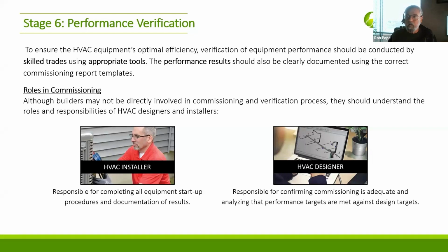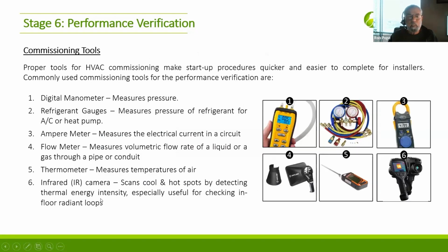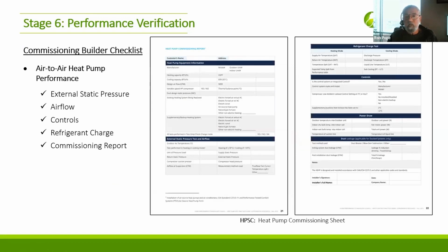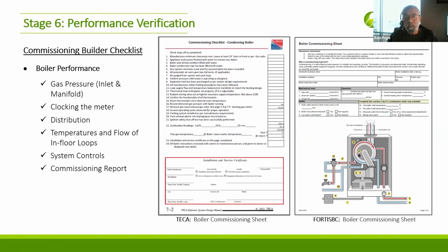That verification is a process, and it's a process that requires the right tools and instruments and procedures. And once that's done, it should all be documented, recorded. There's a lot of documentation available, a lot from the manufacturers directly in their own startup sheet requirements, but also from different agencies that give you nice document tools to check off whatever kind of system you're putting in. And that's what you're seeing here.